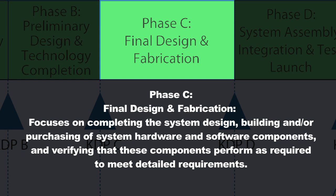During this completion of the design, one of the things that will happen is NASA doesn't usually assign a launch vehicle to a mission, in many cases, until you get into the implementation phase. There's a consideration that not all missions make it through the first phases and get to implementation — they may run over cost, fall behind schedule, or can't be technically completed. So there's a hesitancy to assign the contract for the rocket until you get into implementation. You're defining a satellite early on through preliminary design, but you don't quite know what rocket you're going to be riding on.